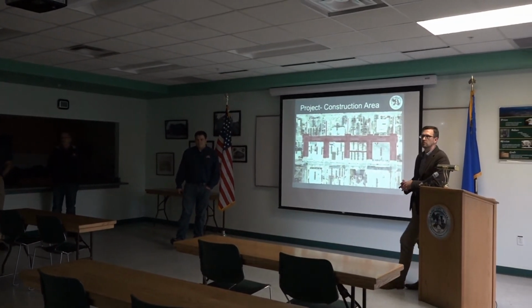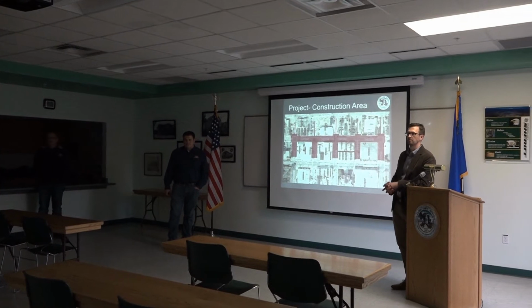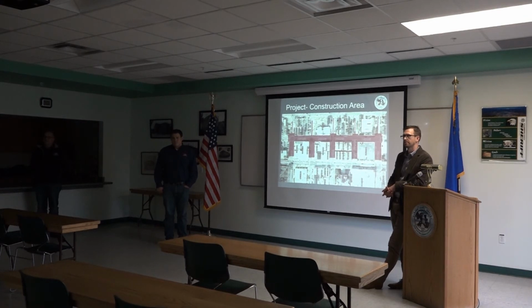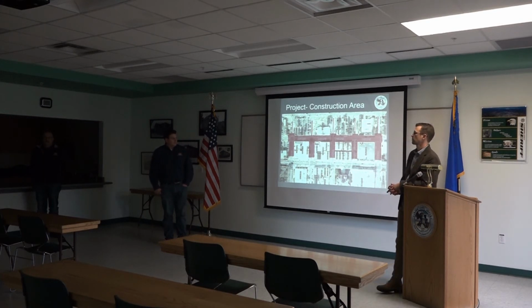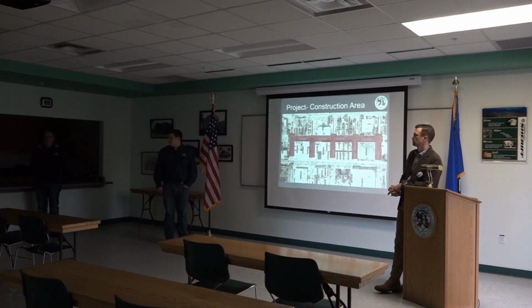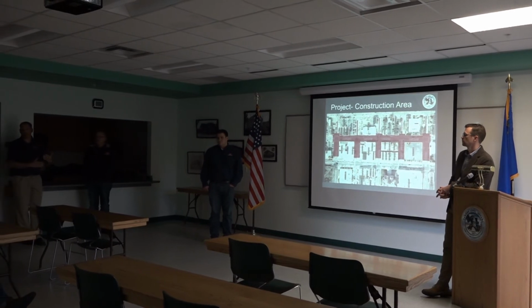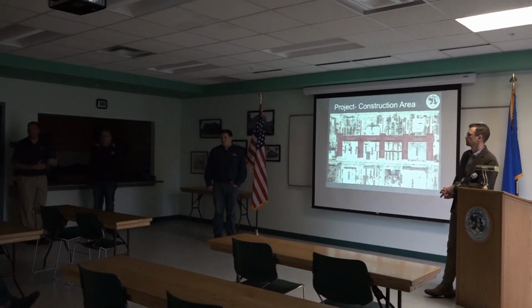So Jeff, is there going to be anybody doing night shifts so you can clear up some of that traffic during the daytime? There will be some night work, mostly for utility connections. And that'll be, again, a case-by-case basis, similar to what we did on Carson Street. We work with each business and find where their impact is least, and then plan the utility cutovers and tie-overs at that point.